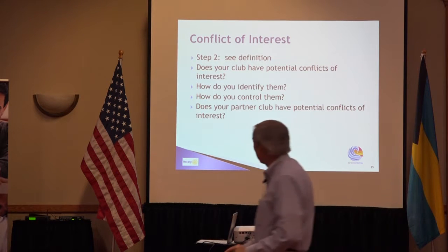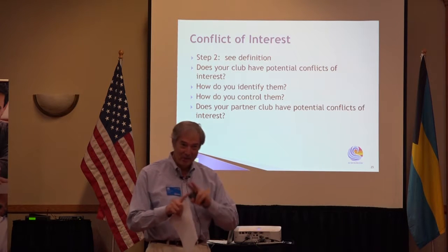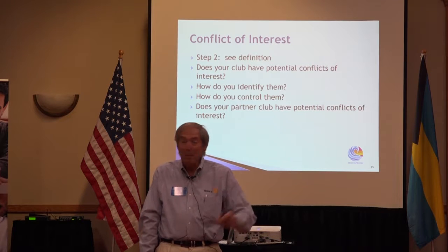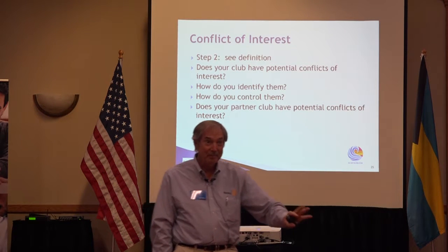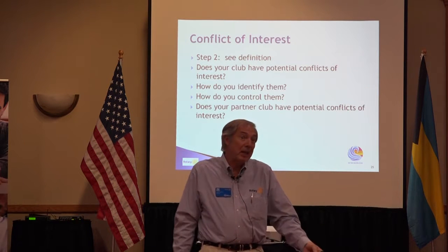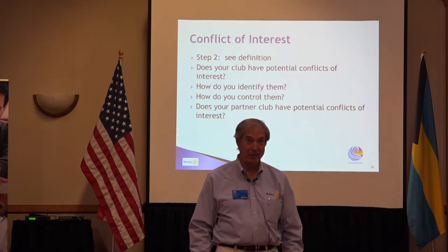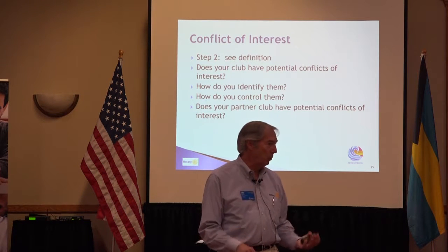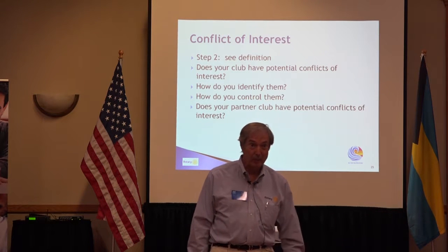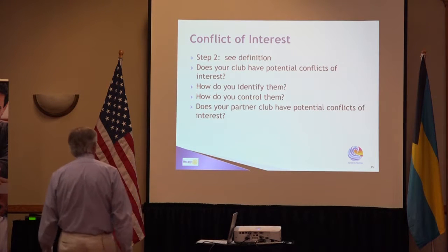So I'm going to make sure that potential conflict is identified, and we figure out how to make sure that he's not in that position. You do it by not letting him handle the money, right? He can be a representative of the church, or he could say, no, I really want to do this for Rotary, and I don't want to be a deacon of the church. You can resolve the problem that way, but it's easier to say, we've got a whole club and we can find other people to manage this project. So that's why you have it.